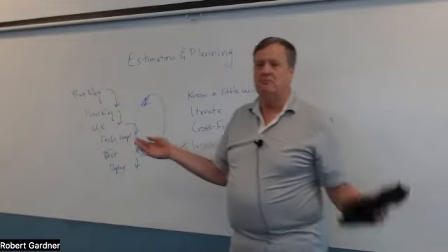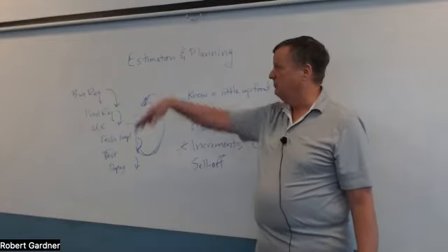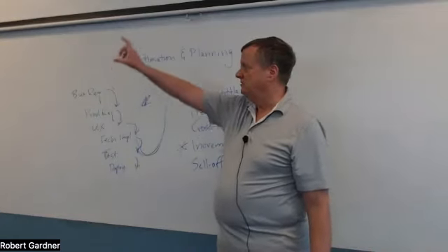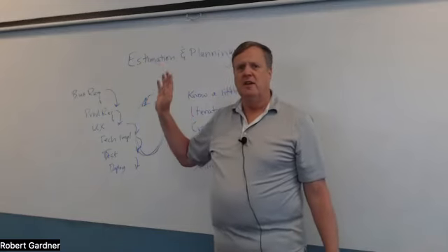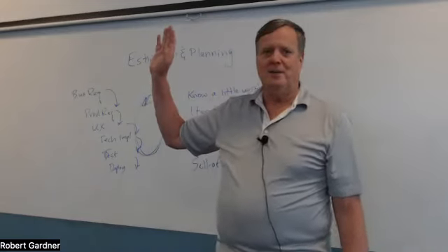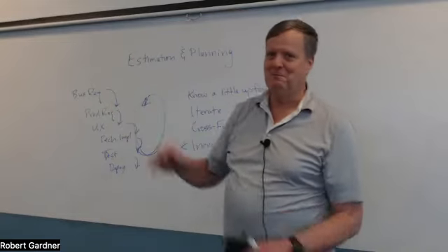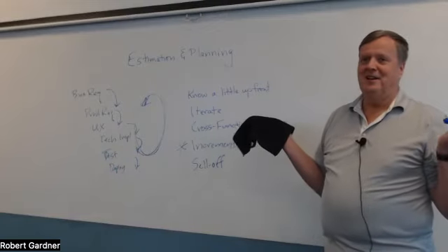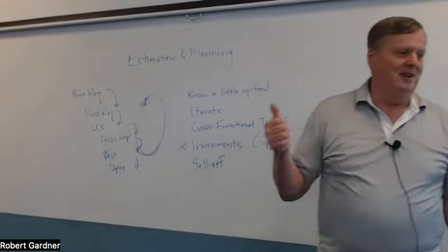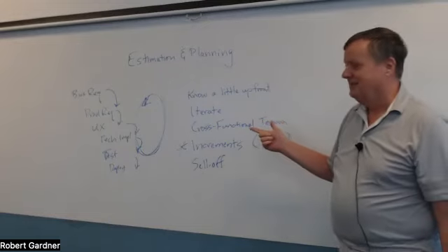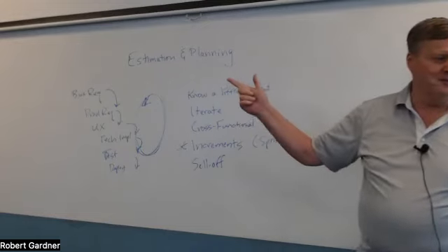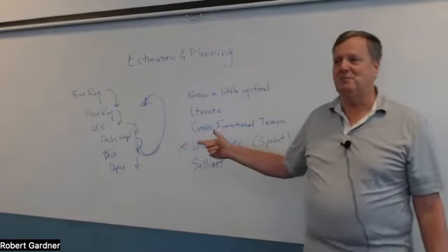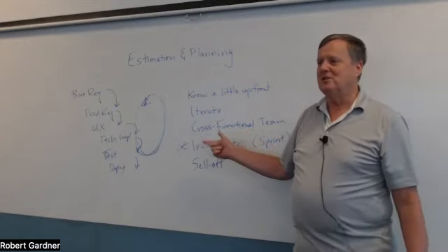So, okay, fine. We just sit down and say, oh, I see that amount of work, we'll have that done, and we have 2 weeks, we can do this piece, we'll just pick it out of there. That's almost never successful. Why? Why is estimation such a hard thing? Unexpected problems come up. We don't account for ramp up time. Any others? Technical problems come up that we hadn't anticipated. So we have all these unknowns, these challenges that come up.